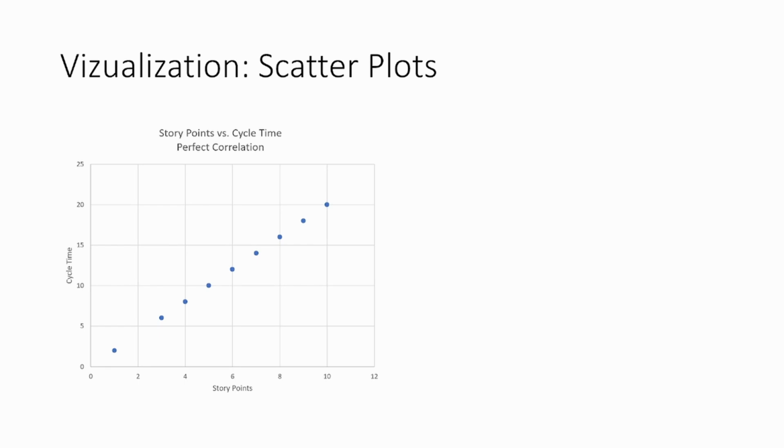When we make estimates, there is always an assumption that we can convert the estimate to some idea of how long it will take to do something. For example, we may estimate a user story or feature in story points, multiply that with a scale factor, and end up with a time duration. We may also, depending on which estimation and planning method we use, add a time buffer, as you would with critical path or critical chain. At the core, though, is this assumption that we have a linear relationship between our estimate and the actual duration.